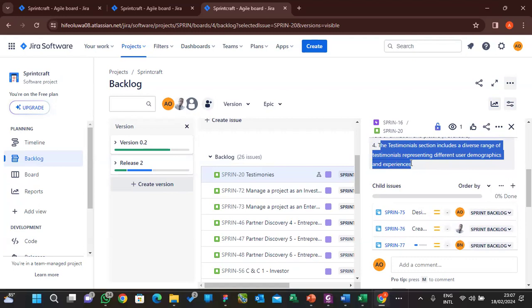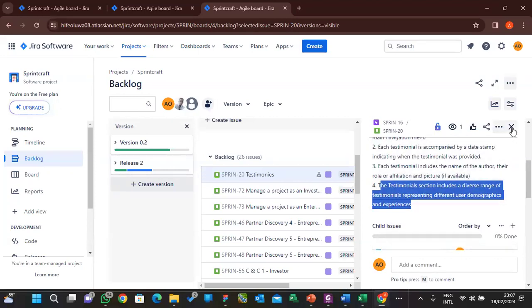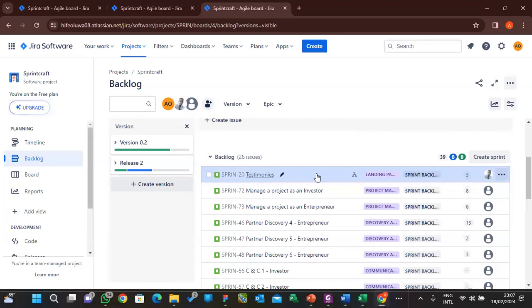Once all of them agree on 3, they are choosing 3. You don't go and take average because maybe you added the total number and it gave you 7, and you go and put 7 there. Please, that is not Scrum. Right. So now, coming back to explain what I was telling you before. Let's assume that these 5 developers all agree that they are going to choose 3 as the story point here, after much deliberation. It's a dialogue. That's why they use planning poker, because they have to dialogue about it.